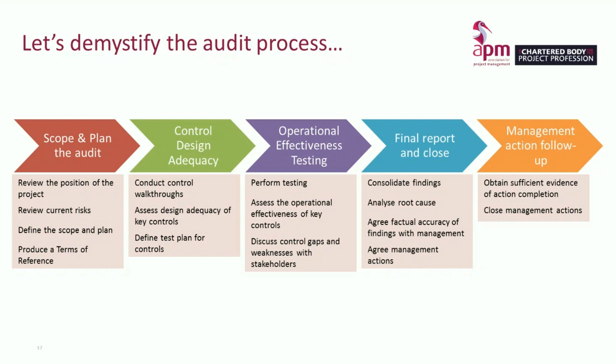Once we have concluded our assessment, any findings should be reviewed with our stakeholders to ensure their factual accuracy. And then an audit report will be produced. The audit report will outline the findings, the impact of those findings, and the root cause. And the purpose of looking at the root cause should be to see, are there any common root causes? Do we see the same things coming up time and time again, especially across different projects? That would then show us that we have a thematic or systemic issue that needs to be addressed.